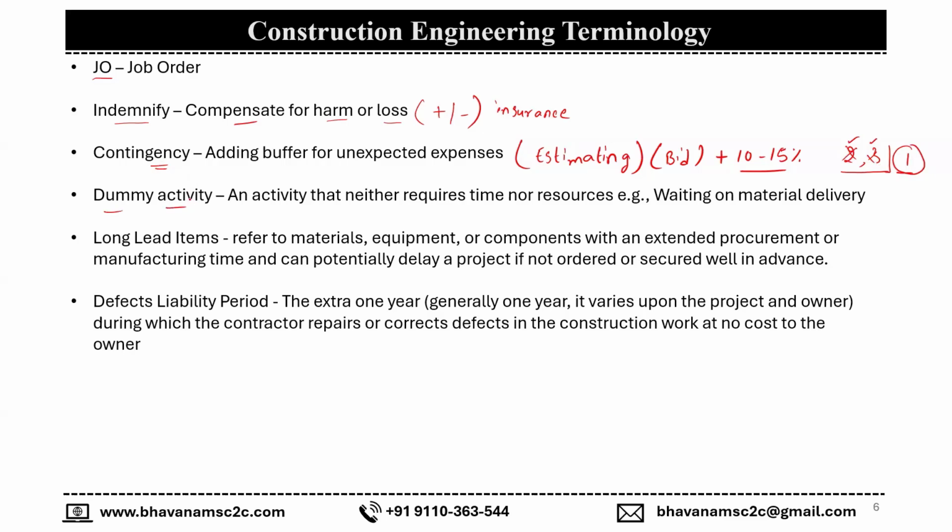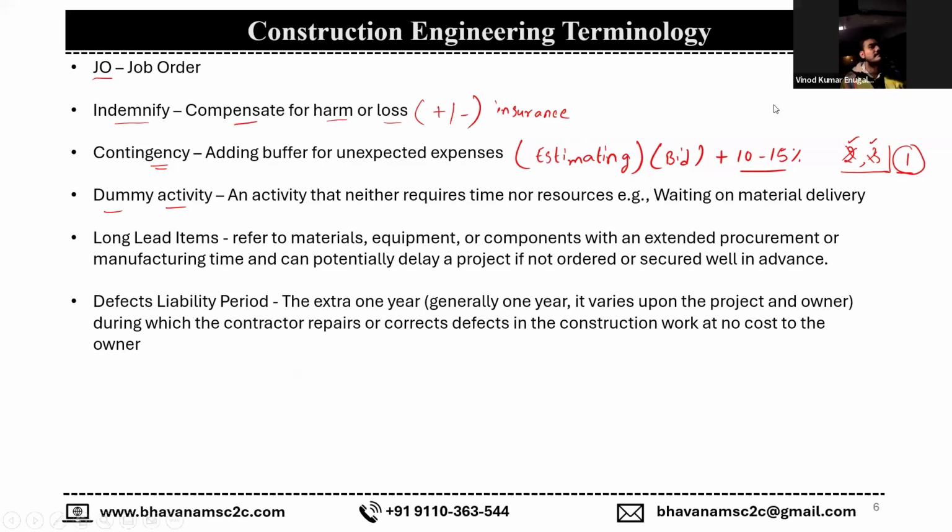Dummy activities, this particular word will be used in your activity relationships, where you represent a certain activity within your activity diagram, but it does not have any duration.